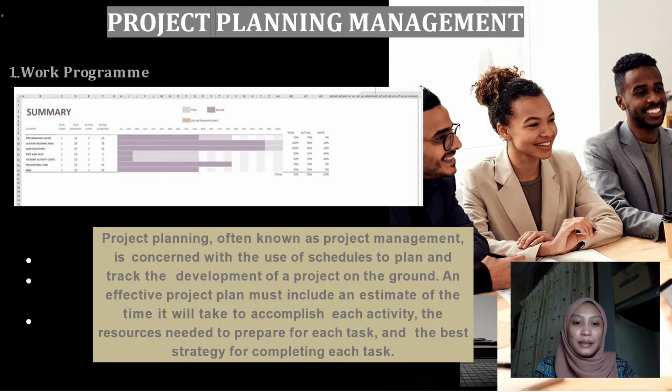The contractor, EnviroWorks Engineering Sdn Bhd, used Microsoft Project to create the performance of each task and work for this project. They also use a Gantt chart as a framework for completing the work within the time span allotted. The work schedule will reveal whether actual progress on site is ahead of schedule or behind schedule compared to their proposed schedule.